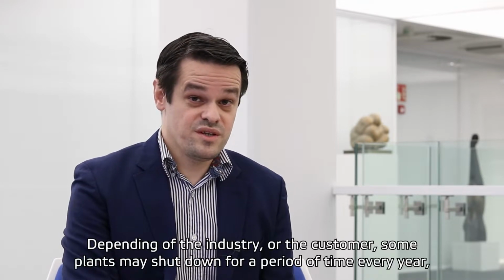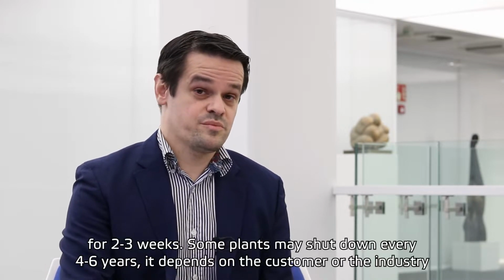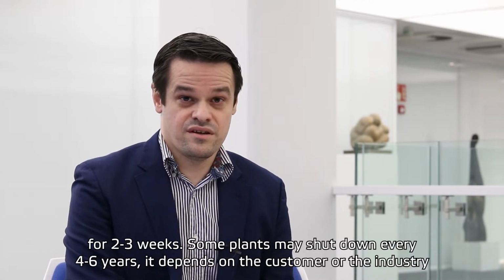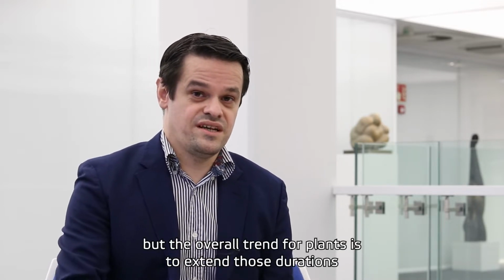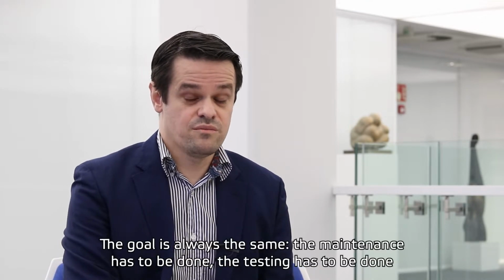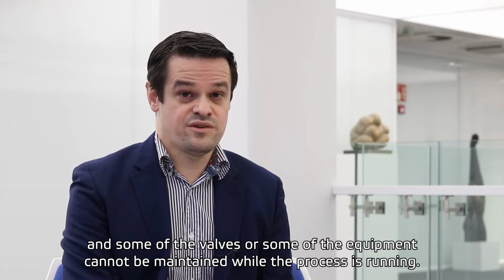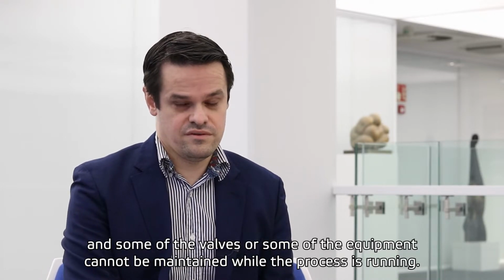Now, it depends on the industry, depends on the customer. Some plants may shut down for an extended period of time every year, and by that I mean 2-3 weeks. Some plants may shut down every 4 years, 5 years, 6 years. Overall, the trend is for plants to really push and extend those durations, and a lot of plants now are aiming for 6-year shutdowns, 7-year shutdowns, always with the same goal: the maintenance has to be done, the testing has to be done, and some of the valves or some of the equipment cannot be maintained while the process is running.